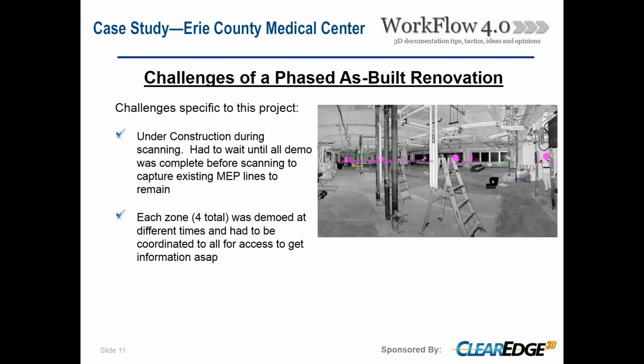So some of the challenges for this particular project were just having a lot of people in the area. We had to wait until the demo was complete before we could scan. However, when we got in there to scan, there were still some things that were existing that were supposed to be demoed but weren't yet. So having to have somebody mark up after the scan was done what was to remain and what was to be demolished, so that we didn't model anything that wasn't going to remain.